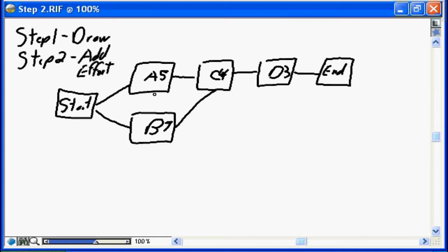That is true. That again is why we will use a piece of software, such as Microsoft Project, to draw our network diagrams for us, because it will address the issues, the limitations, the impact of having resource number 1 required to put 5 days worth of effort in, but they're only available 80% of the time to make allowances for sick, vacation, and other unavailable time.